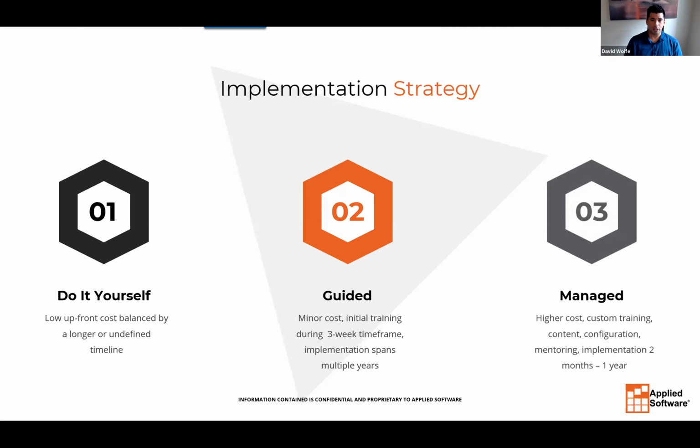And so this is where it's going to be higher cost. But you have the option of configuring and customizing everything. The benefit is you're going to be up to speed faster. And so the full implementation is going to look longer, but that just means that maybe we're working on this for 2 or 3 months ahead of your team seeing the work, so that your actual team time out is a lot shorter, but the overall implementation is going to take longer.